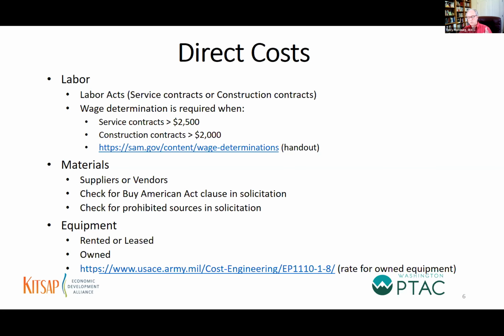used to know the Labor Act as the Davis-Bacon Act, that kicks in, and there will be general decisions from the U.S. Department of Labor, a labor decision in there, a wage determination in there, that you have to pay your employees at least that amount of money that's in there. I have provided you a website there to find the wage determinations. I might add at this time that it is your responsibility, not the government's responsibility, that you ensure that you pay your employees in accordance with the U.S. Department of Labor wage determination.